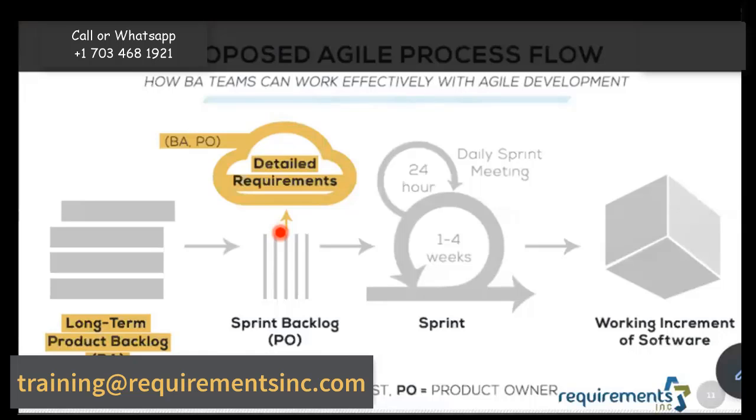And then the 6 sizes work, more or less, for most people, correct? So one, the smaller the options, the easier it is. Otherwise, you'll be fighting about, okay, should this be a 12 or a 13 or a 10 or 11? At that level, in the grand scheme of things, if it's more than 8, just bump it into a 13. You don't have to think too much about it, right?